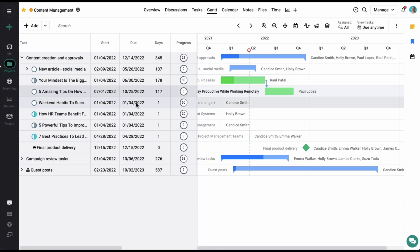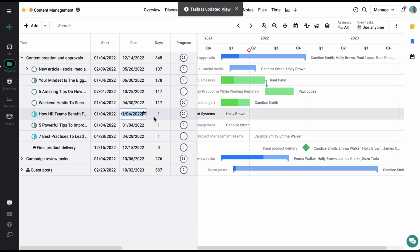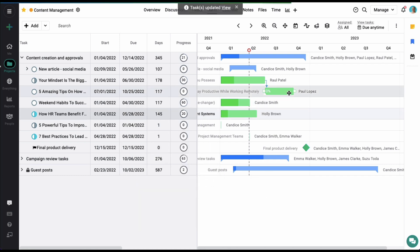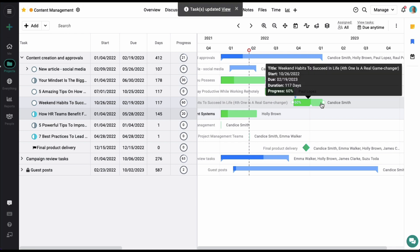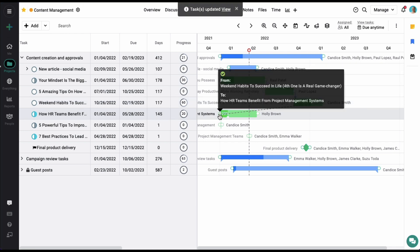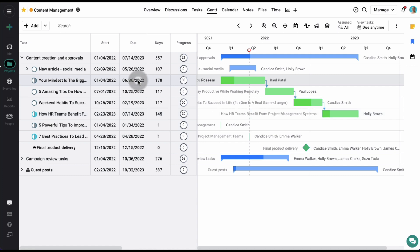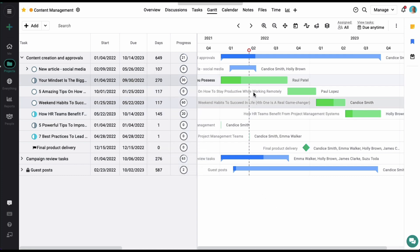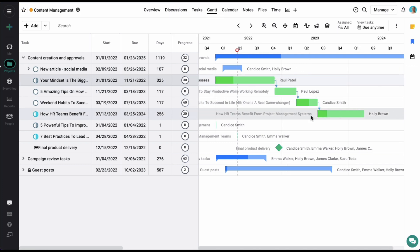Let's set up a few more dates and dependencies. Let's set up a dependency between these two tasks and for these two as well. Once we have set up the dependencies, if one task is delayed by a few days — let's delay this task forward — you can see that it will automatically adjust the dates for all the dependent tasks.